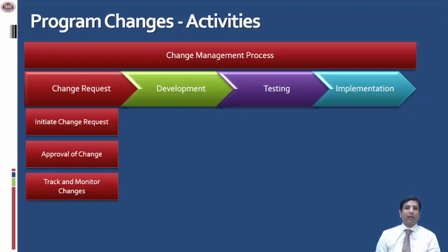All changes need to be tracked and monitored because every day new changes are initiated. All the changes need to be monitored and tracked to completion. When the change goes to development, that is after the change is initiated and the approval is provided, the change is going into development mode. During the development, the analysis and design is made. Analysis and design is more detailed when the change is a large change. For small minor changes and bug fixes, it is likely that analysis and design may not be required. It depends on the nature and type of change.